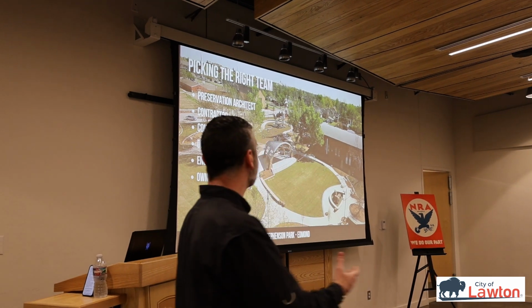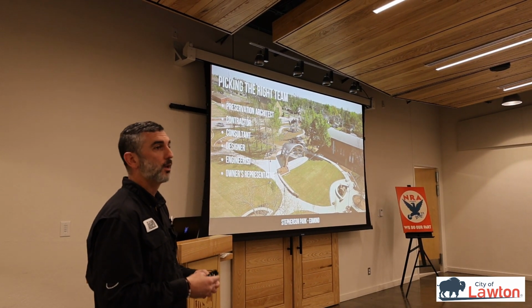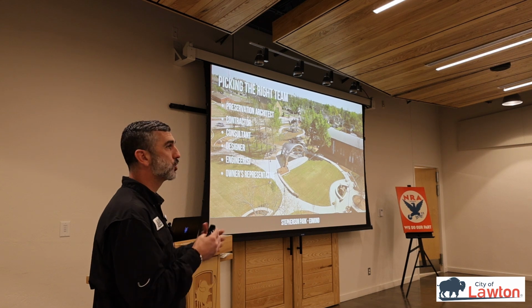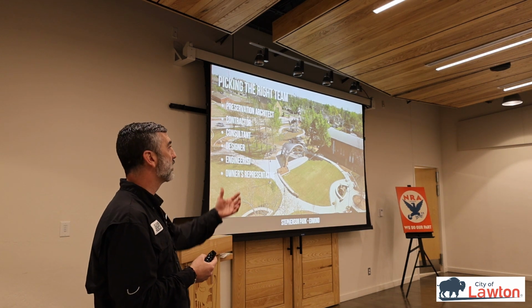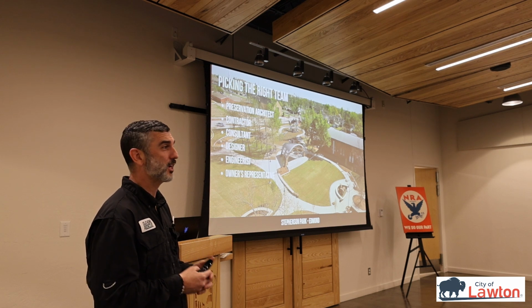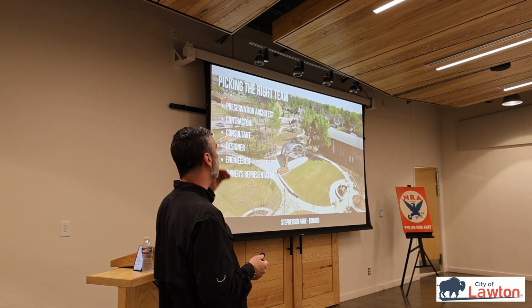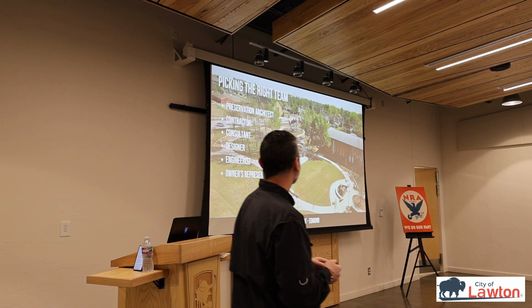So if you are bringing in a contractor for one of your projects, bring them in early in the conceptual phase. Start working those out, because if you're at 30% completion on construction documents, it's a whole lot easier to make changes than you are at 90%. And you're going to have cost savings by paying a contractor to work from the early stages.